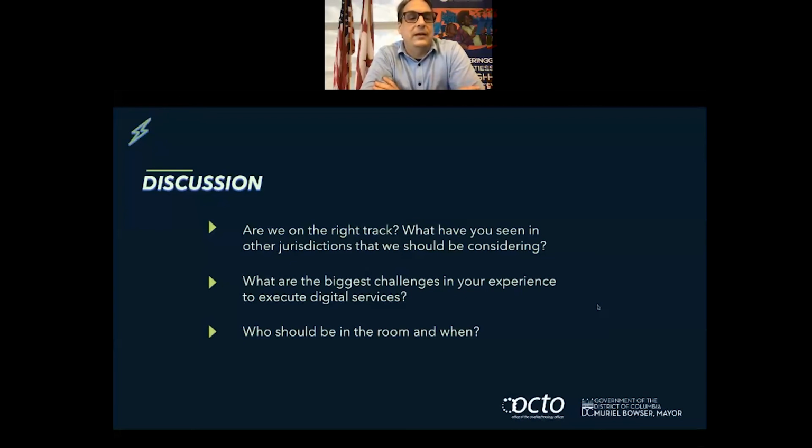But this also is going to provide specialist teams through STAR that will allow us to break our product plans down into logical work streams and deliverables. So instead of having one giant procurement, we are streamlining that vendor proposal process by having this easy, quick, task order based vehicle available that's got fixed prices and a 2 to 4 week time frame for award. This is the future of government procurement, I feel. It's going to be easy to get a task order around here, to get a vetted and experienced team available for a variety of workloads on a project.